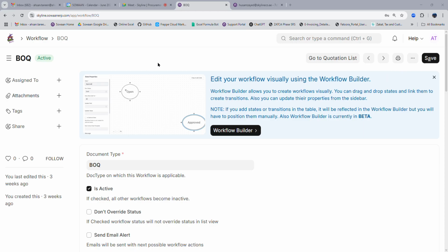So it is pending for approval. As soon as the storekeeper on site triggers this request, the project manager on site, like Osam, can approve or reject. He himself can trigger a request, which he can approve or reject by himself. I am working from Osam's user. It is approved by the PM, but if you go to see the status, it is still in draft mode, still waiting to be checked and promoted by the purchase.